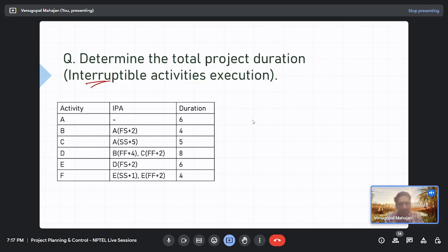What you see is connected bar charts, but the calculation going on behind them is actually PDM only, because CPM is not able to deal with those kinds of relationships, right?